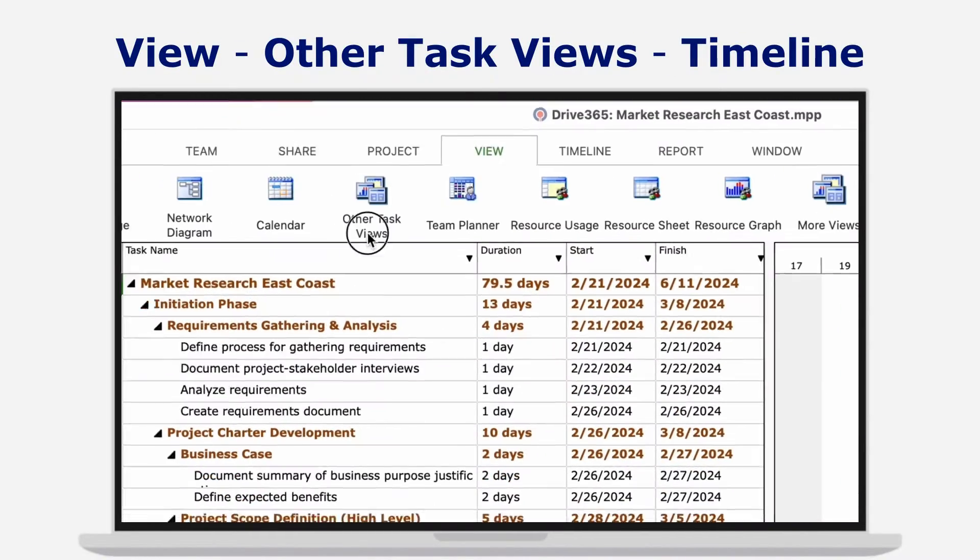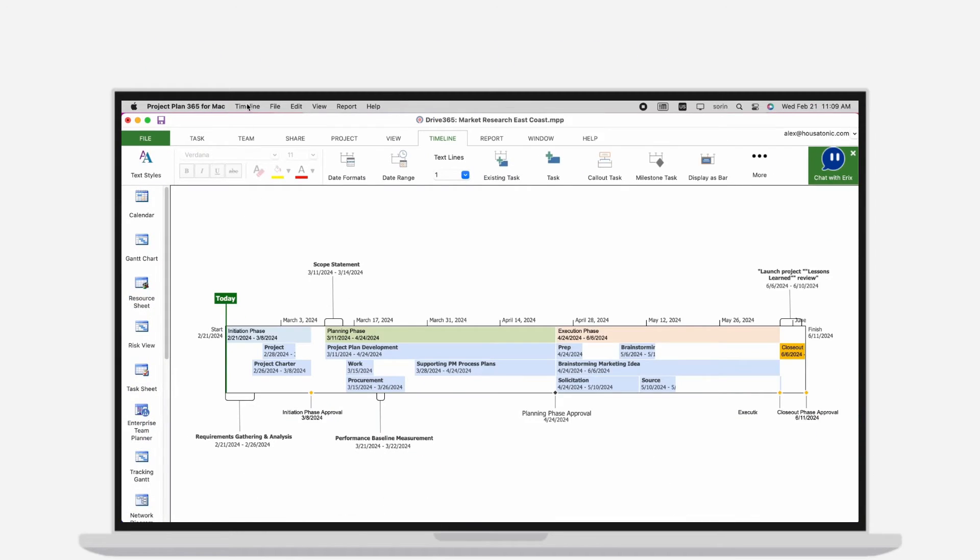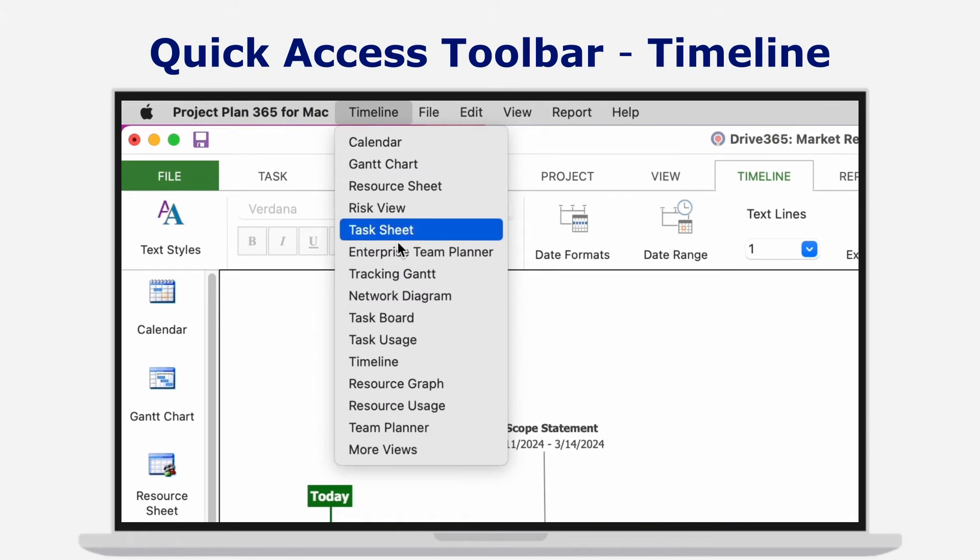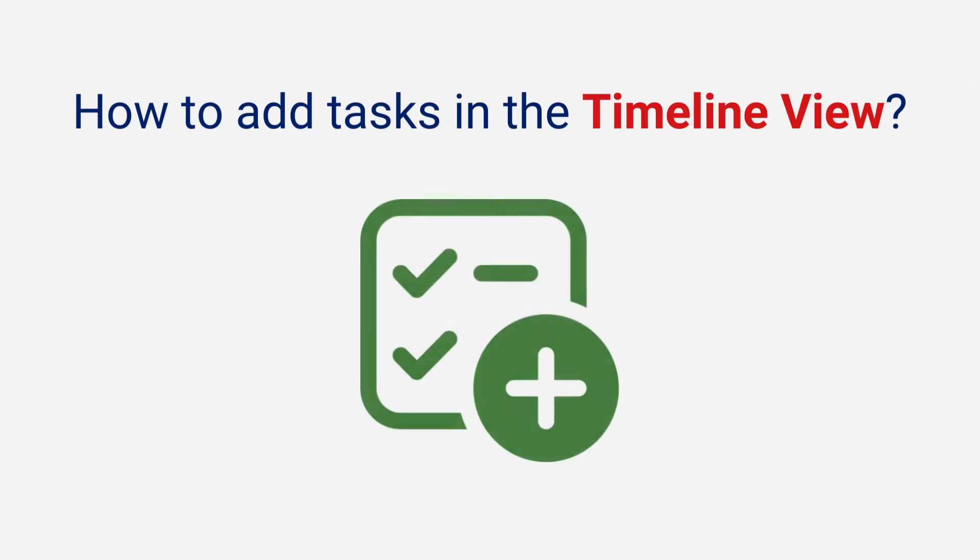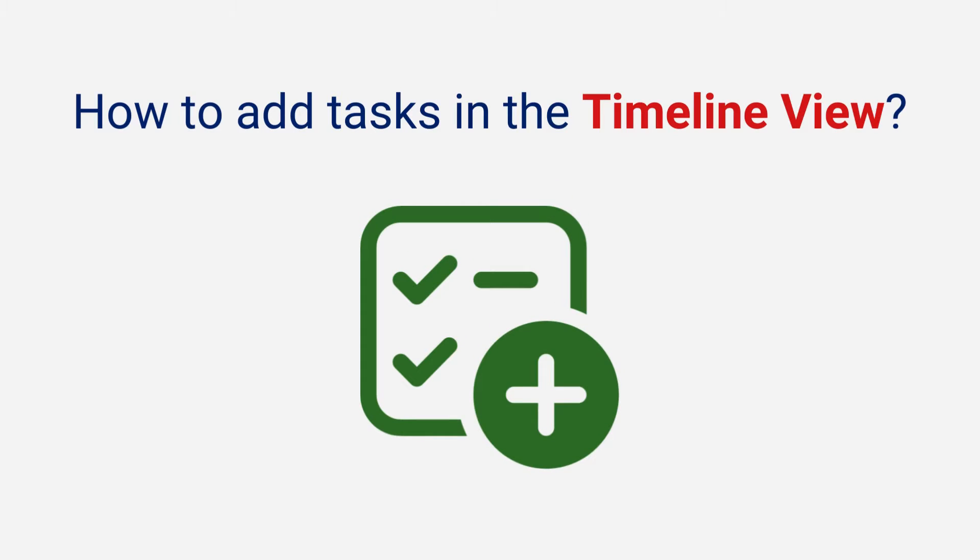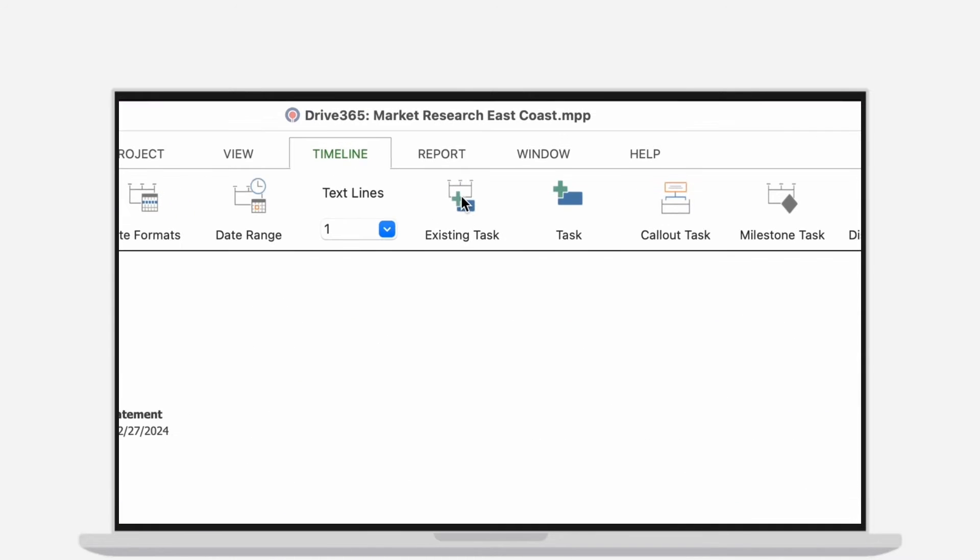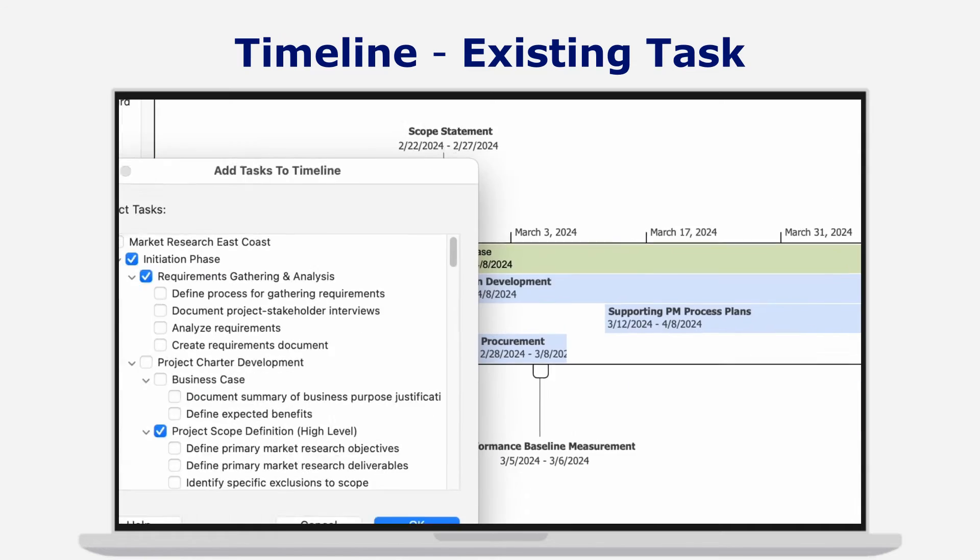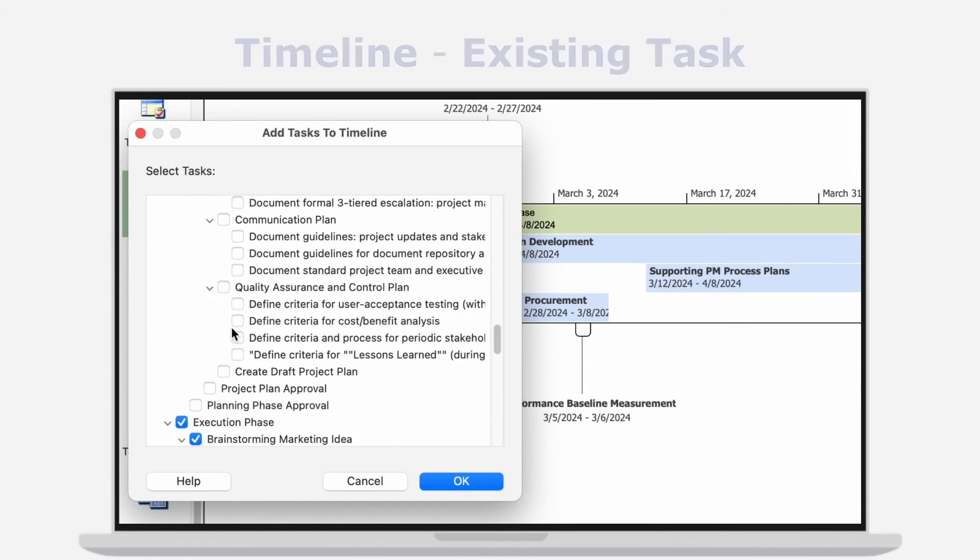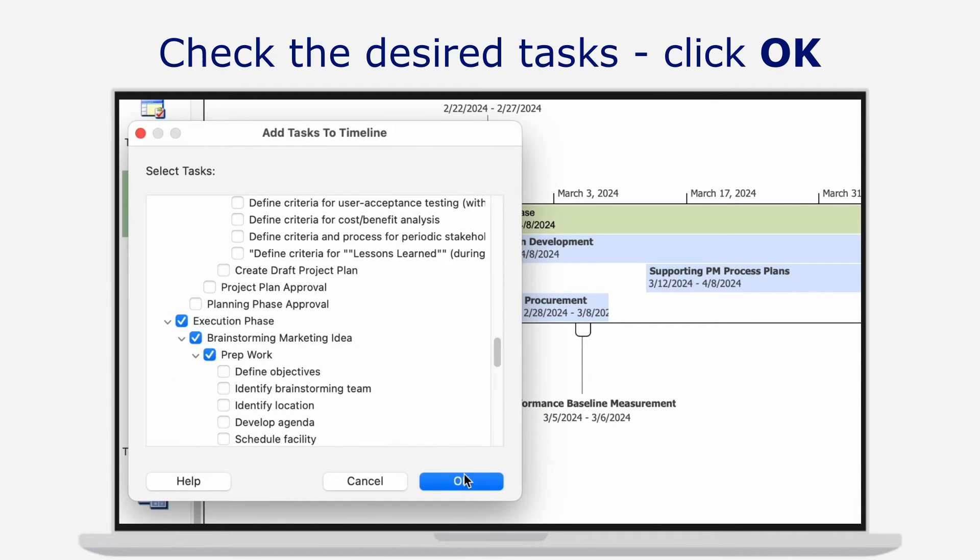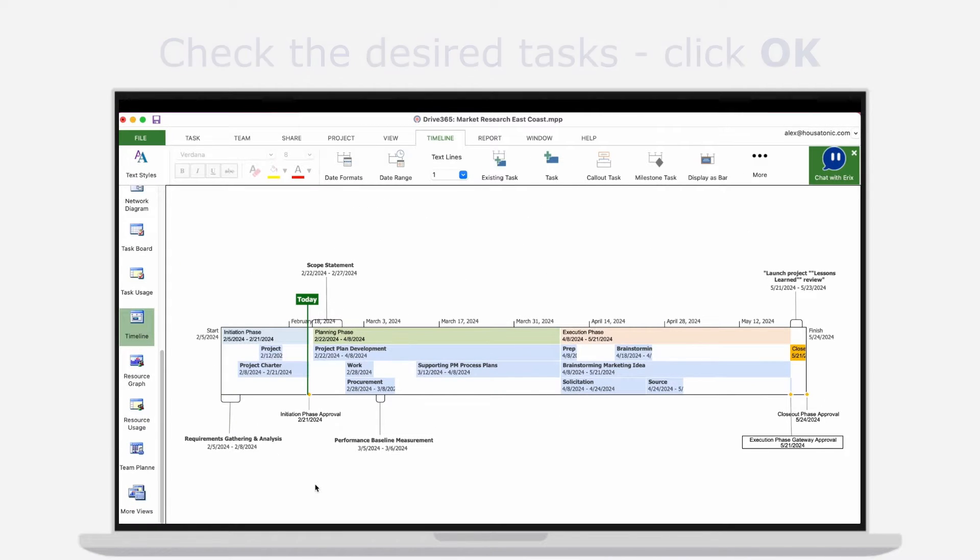How to add tasks in the Timeline View: Add existing tasks in the timeline view by going to menu Timeline, Existing Task. Check the tasks you want to be displayed in the timeline and click OK.